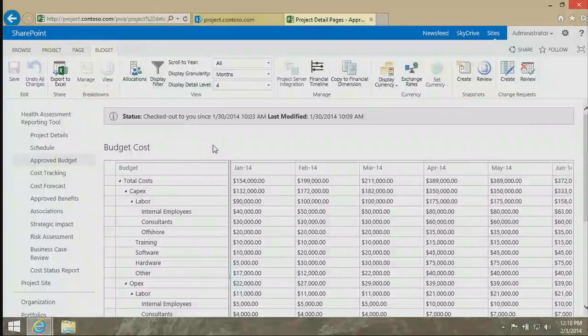But it's also possible to maintain your committed, and maybe use a different vernacular, committed versus your accruals, and you can compare and contrast. Now, if you want to push that back to the ERP system, you can. That's going to be a little bit of customization. But I can look at committed versus my accruals per period, manage them independently, and look at the differences. But it's not set up in that way for this particular demonstration.